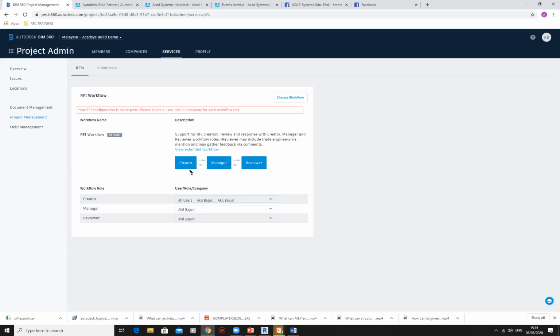So that is also not wrong, but it is kind of a misuse of BIM360 for that purpose, because you are expecting the RFI process and communication to be recorded in BIM360, but if you bring this process out of BIM360 and re-upload again, it doesn't serve the purpose of BIM360. So again, you have to make sure all the persons are invited into BIM360 to work with RFI.